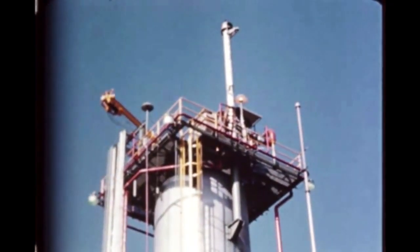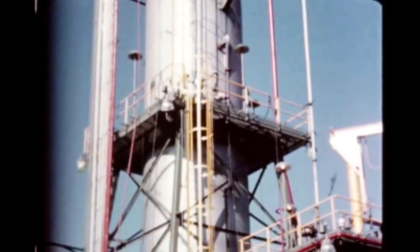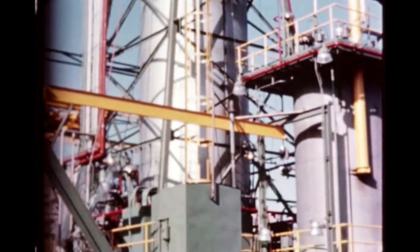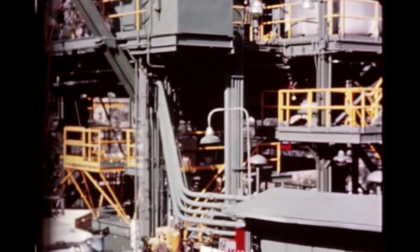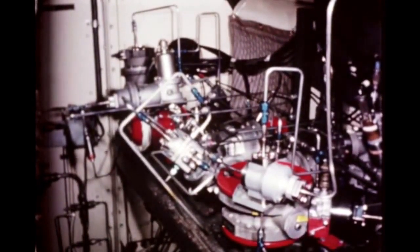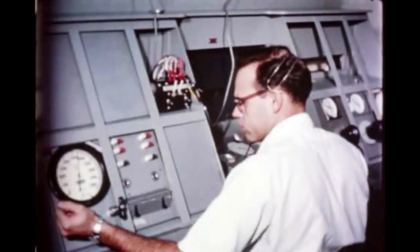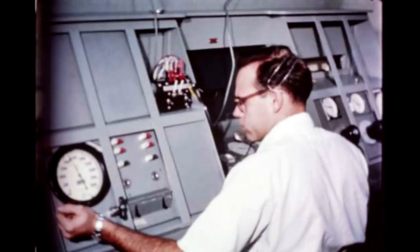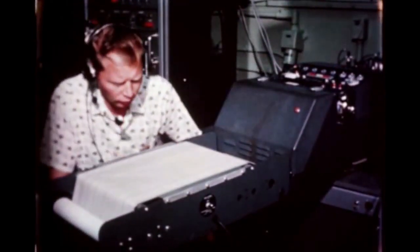At Santa Susana, Vertical Test Stand 3A is closed for renovation. Accessory improvements are expected to provide better engine start conditions and more effective altitude simulation for flight rating. The stand will be reactivated in January 1965. As a result of a J2 engine gas generator explosion last quarter, Rocketdyne built a pneumatic control system mock-up, including the gas generator, to evaluate the problem and determine a solution. The J2 engine gas generator valve case was connected to the control pressure point, then tested. Analysis of test data indicated that this method of assembly would be successful in preventing an explosion.